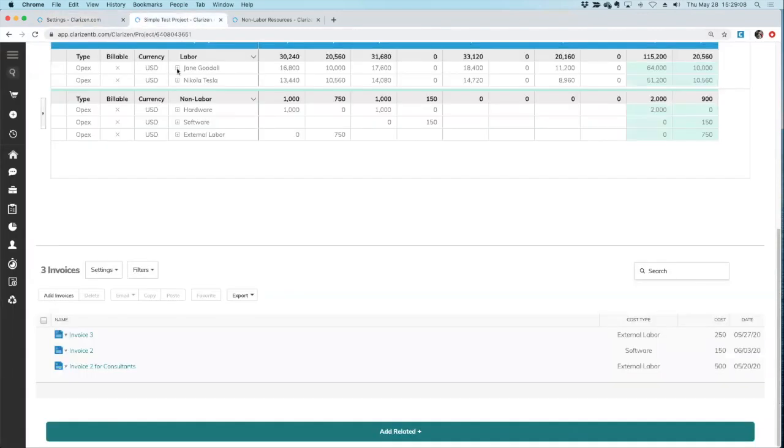The invoice object is created. Then after that, the backend creates the relationship from the invoice to the project. It's actually two steps. So if I try to trigger something on creation that depends on the relationship, very often it will fail. It's almost like it doesn't know that the related project is there yet. So it's almost a sequence. First, we create the object, and then the backend system creates the relationship.